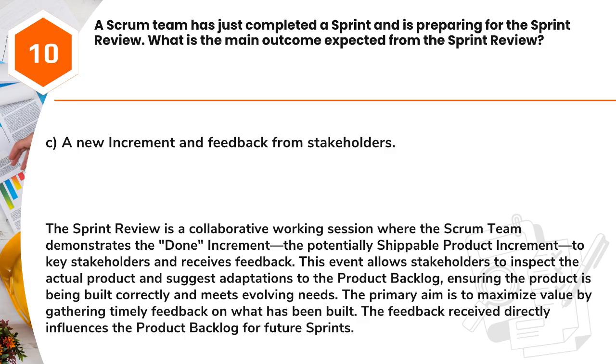Answer: C. A new increment and feedback from stakeholders. The sprint review is a collaborative working session where the Scrum team demonstrates the done increment, the potentially shippable product increment, to key stakeholders and receives feedback.